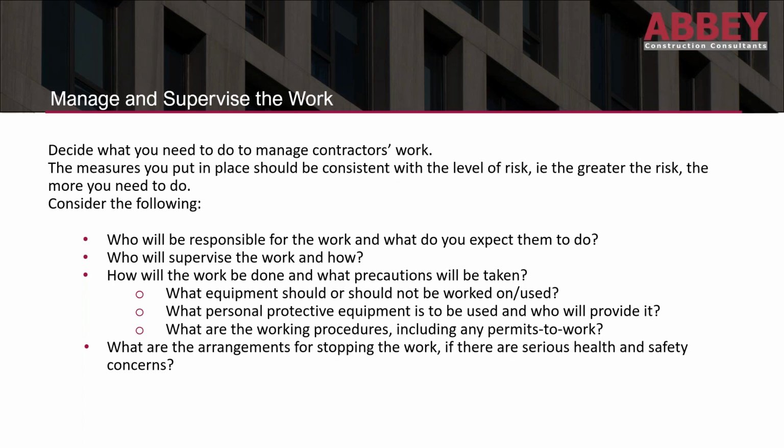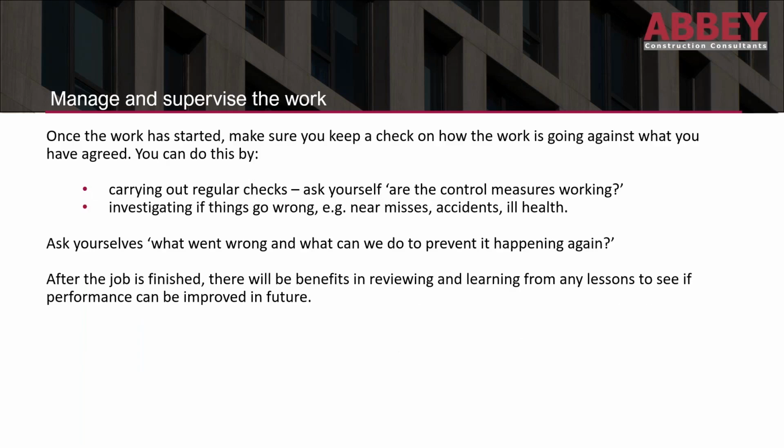What are the working procedures, including permits to work? And what are the arrangements for stopping the work if there are serious health and safety concerns? So if the client or their representative went on site and wanted to halt work activities because there was a risk of serious or imminent danger, what's the procedure for doing that? That would also need to be stated.